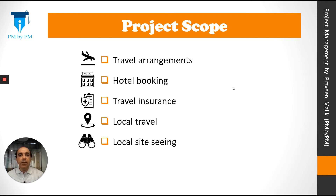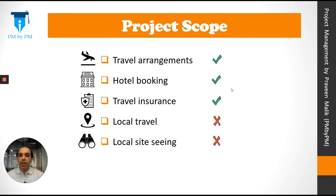But let's understand it from the project manager's perspective. From the project manager's perspective, all five things may not be part of the scope. Let's consider that the first three are part of project scope and the last two are not. So we will do travel arrangements, hotel booking, and travel insurance, but we will not make arrangements for local travel and local sightseeing.